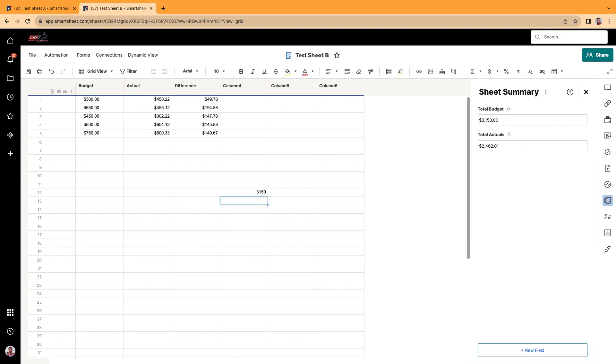That's how you know that this cell right here is coming from the sheet summary because it has a pound symbol next to it. So if I click enter, there it is. There's the exact same number. Make this a currency. Look at that.